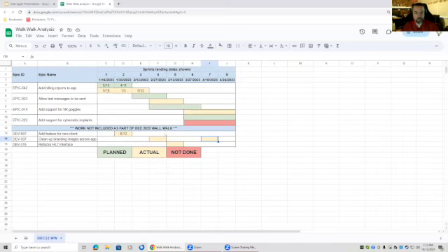Now the numbers, which I've only put in a few boxes here, I've used this before with Scrum teams. After they've done a wall walk, they've planned a certain number of sprints, they've executed them, we're done, shipped. Now we want to have kind of a release retrospective or a wall walk retrospective. One of the things I got feedback on from the teams was the need for these numbers, where 5 is the number of tickets and 13 is the number of points. That's probably not something you want to show to your leadership unless they're sophisticated, but your development teams may want to see that.